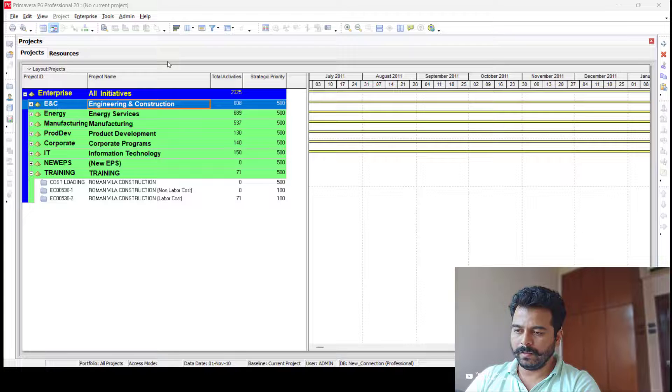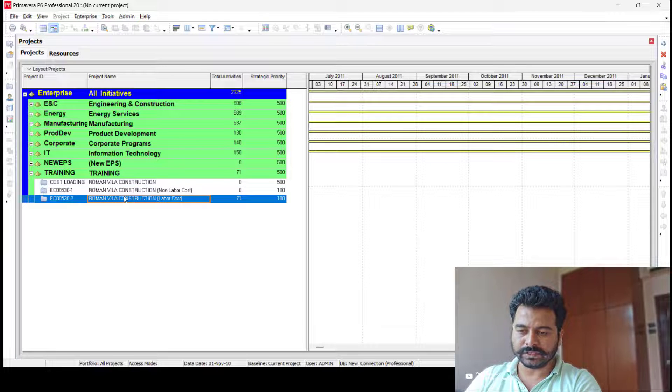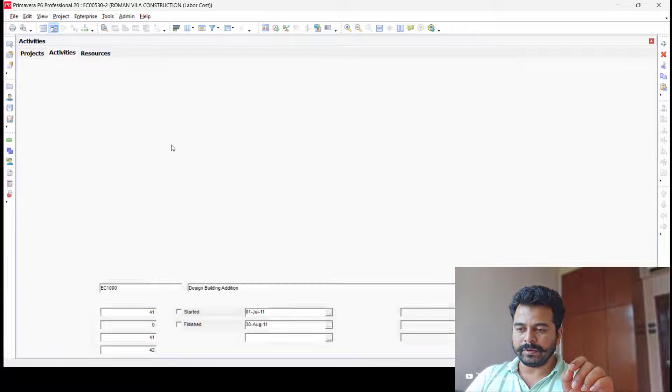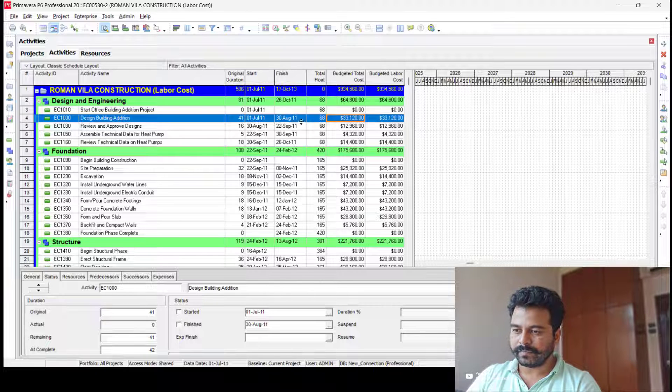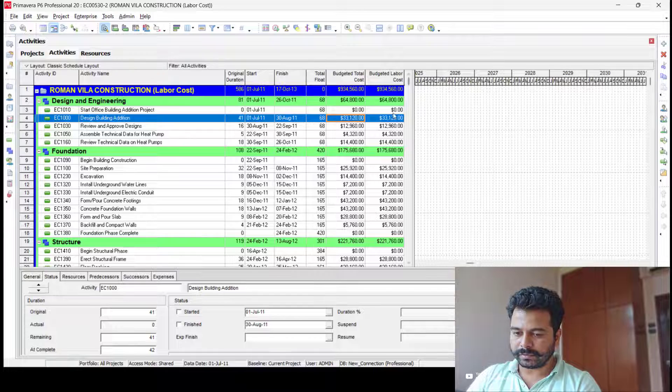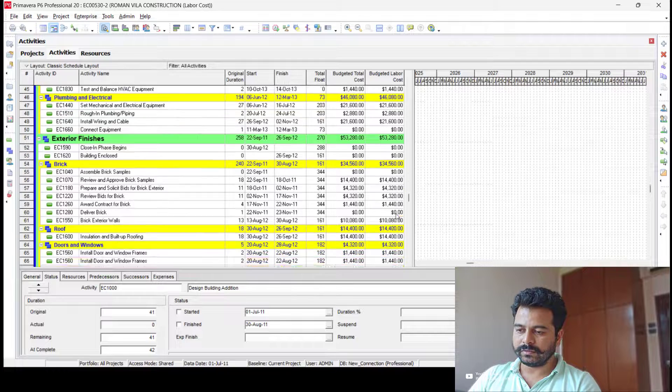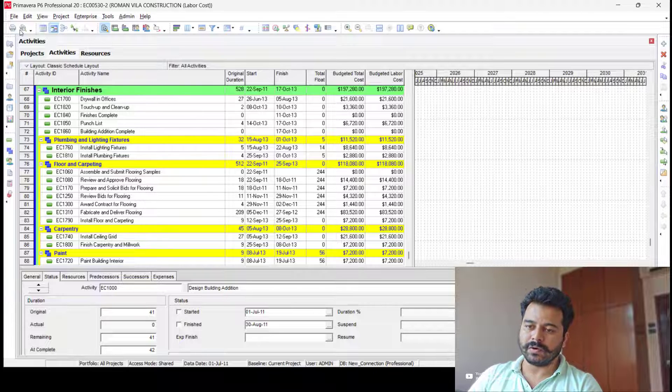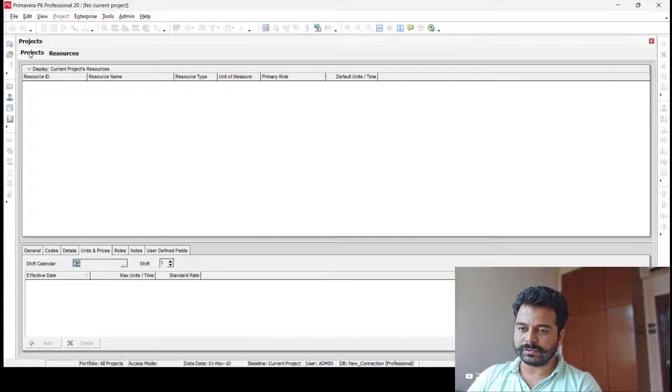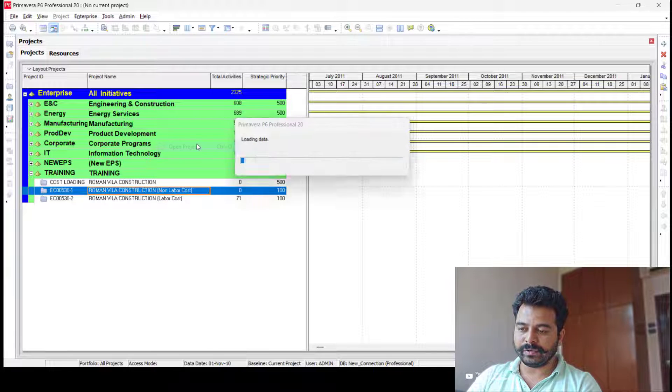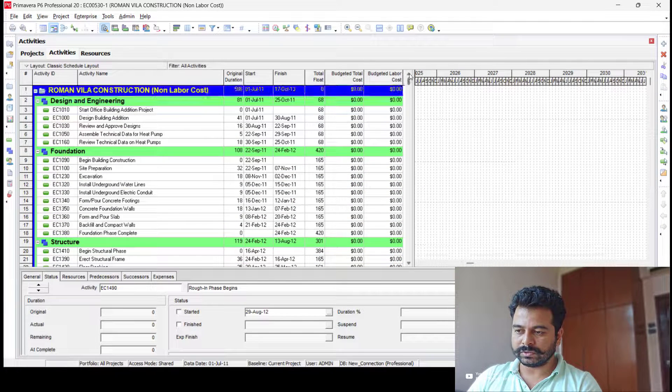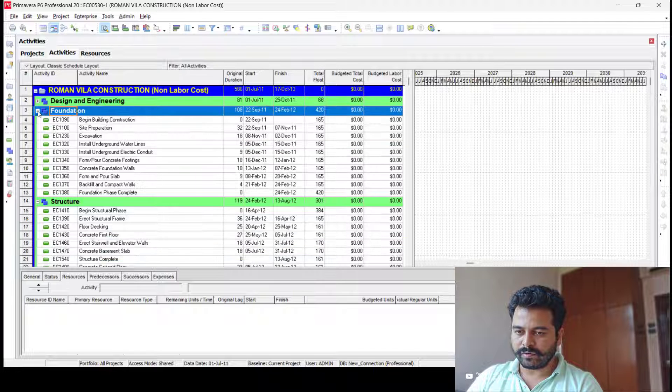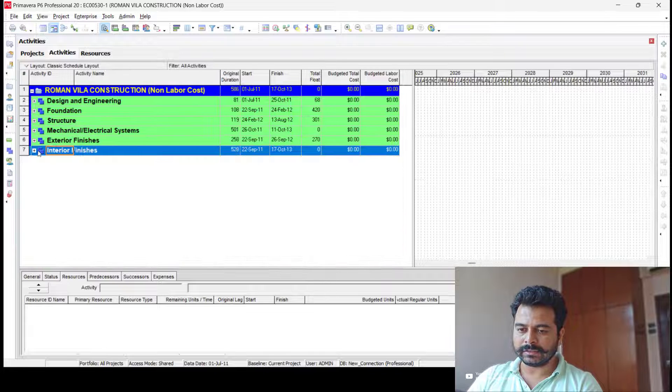We have two files. One is labor cost loaded, which is the traditional way of cost loading where labor cost per hour is distributed to the activities and multiplied by duration to get the total cost from budgeted labor. Since there's no material cost, it becomes the budgeted total cost. However, I'm not interested in this because I want to upload cost directly from the BOQ. So I'll be opening this file where there is no labor cost associated and no resource assigned as well. You can see I have design, build, foundation, structure, mechanical, exterior, and interior finishes.